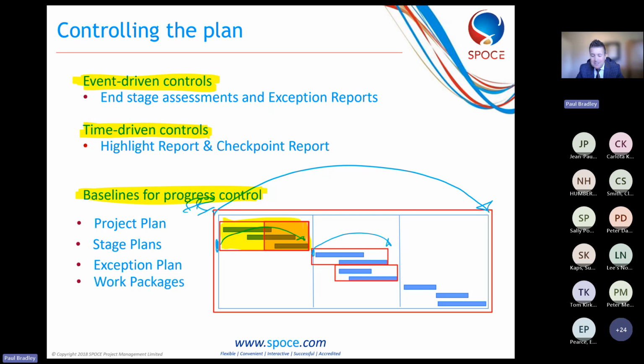And then we've got work packages. Each individual work package would form a baseline for the teams to work and carry out the work, and the baseline will be defined in the timescales and costs and so on. So that works really well in our favour with regard to understanding what we're trying to control, what we're reporting on, and what we need to do.